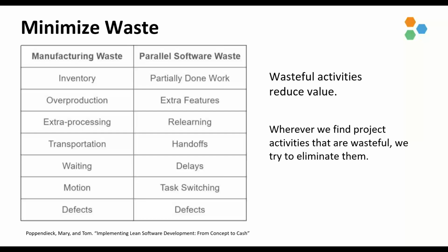And that brings us to the next one. Handoffs is where we're passing information from one team member to another, which may cause loss or even change in the information. So for example, communicating customer requirements from a customer representative to the analyst, and then to a team member, and then finally to the developer that's going to be developing the product.